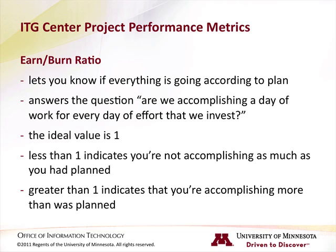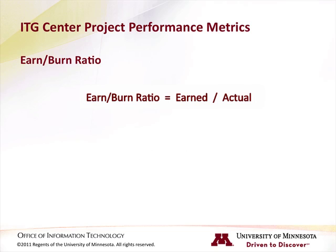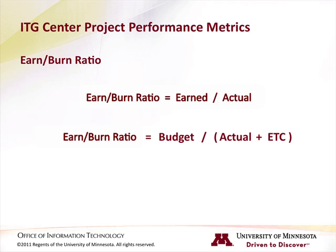Values greater than 1 indicate that you're accomplishing more than was planned. The calculation for the earned-burn ratio looks like this: earned divided by actuals. Or another way to view this calculation is: the earned-burn ratio equals budget divided by actuals plus ETC. Again, notice the role that the core metrics play in determining this metric.